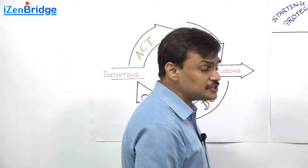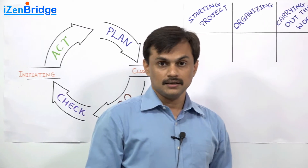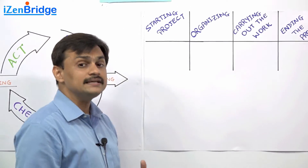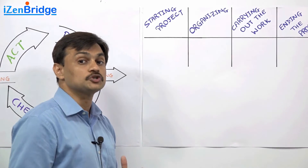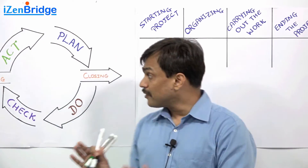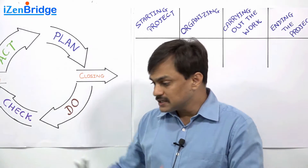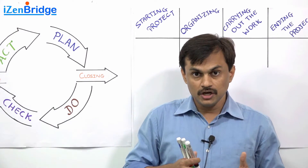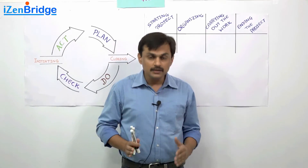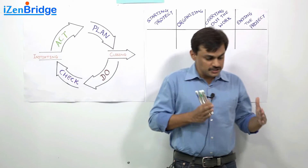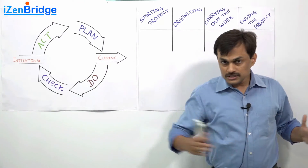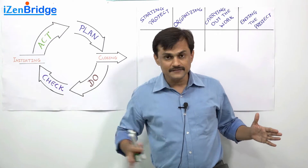The confusion which many test takers end up facing is they start relating these process groups with the project management lifecycle. These process groups are not stages in the project. It's not like you are doing Initiating, then Planning, then Executing, then checking and acting, and then Closing. It's not a sequence — it's not a project lifecycle.